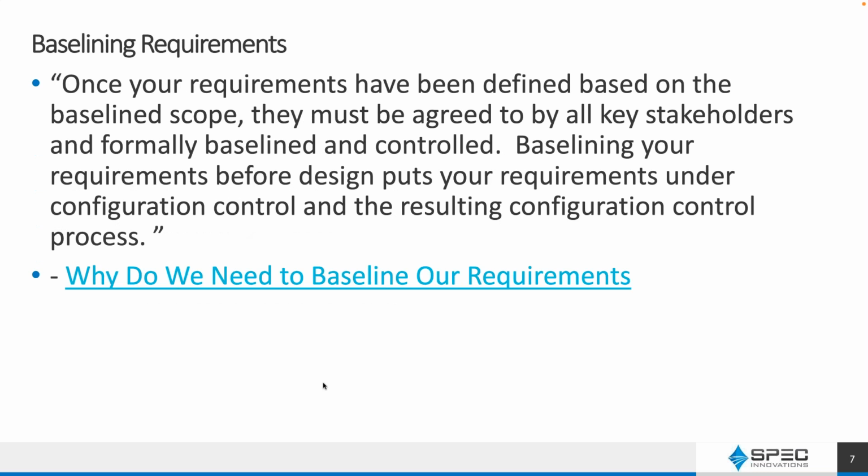So about baselining requirements. Once you have them defined, you have them in a form that you're ready to go. You want to put it under some kind of configuration control because you don't want requirements changing too rapidly. You want to watch out for requirements creep. Okay, that's always a big problem. We have this problem every time we're building our software.